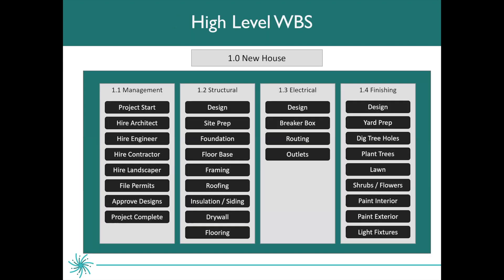Here's a portion of a work breakdown structure for building a new house. New house 1.0 is your level one. 1.1, 1.2, 1.3, and 1.4 are your level two, focusing on management, structural, electrical, and finishing. Below that, you'll see a mix of milestones and tasks. Once you've successfully completed this step, you are now ready to move on to sequencing the activities.